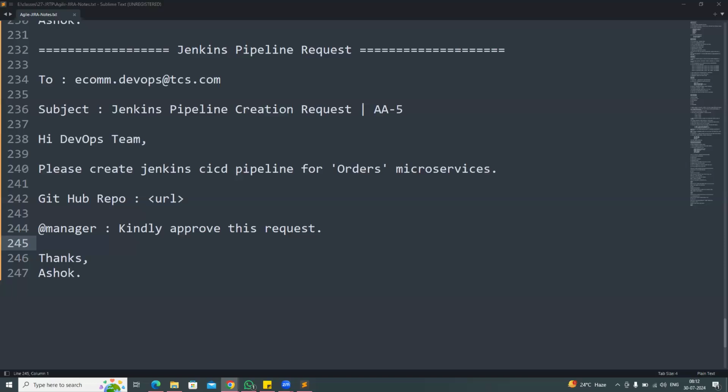So you have to complete 30 points for this sprint, right? Do you assign 30 points of stories at a time, or do you first assign one story? No, take only one story, then you need to complete it. Once it is completed, then you need to take the next story.